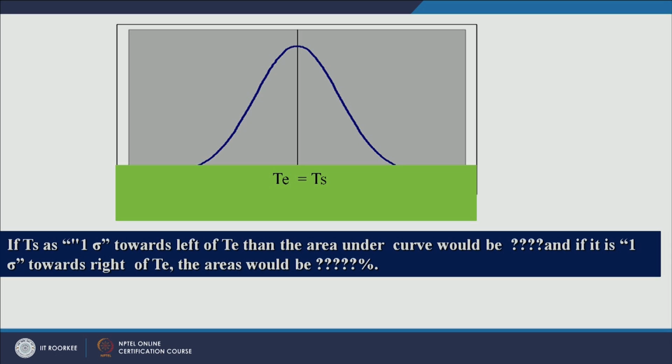We will use this information in solving a couple of questions. So far we have calculated TE and TL for the networks, and I have also said that TE at the last node is nothing but the duration which a project will take for its completion. TS is the scheduled completion time, which would be given by your client.